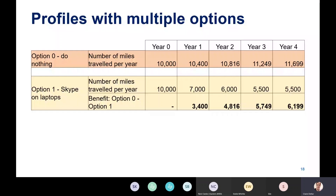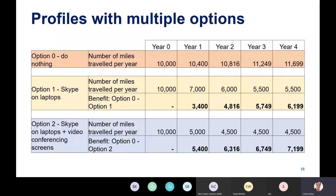With another option — rolling out Skype on laptops plus video conferencing screens in offices — you can see it has an even bigger and quicker impact. That's one profile which lets us compare different options for one benefit. We would then take all key benefits and dis-benefits, add them up across the option, because it may be that the Skype-only option doesn't save as many miles, but there may be another benefit that outweighs that difference.